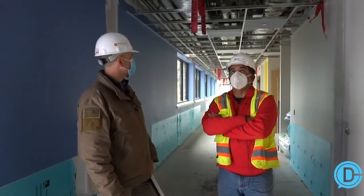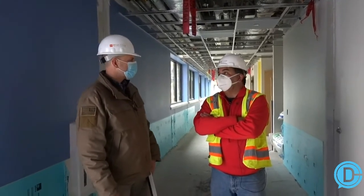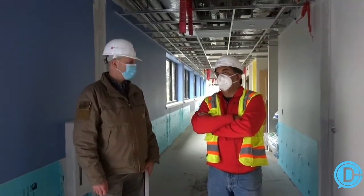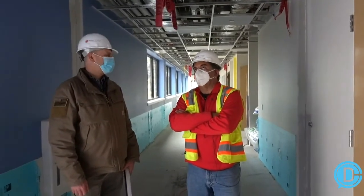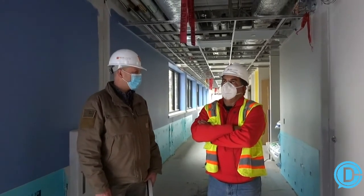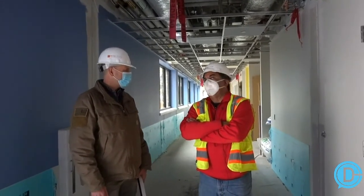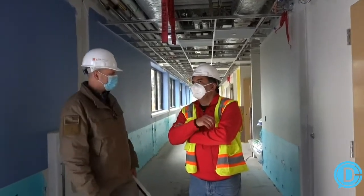And I wasn't kidding before, the facility is asking us to expedite the schedule as best we can. They're chomping at the bit. Now that it's here, now the pressure's really on. We were scheduled originally for sometime end of July, mid-July. We're going to do everything we can to get that into the middle of June. Wow. If we can, and there's no reason why we can't, as long as we can make this penetration. That's like a month and a half.